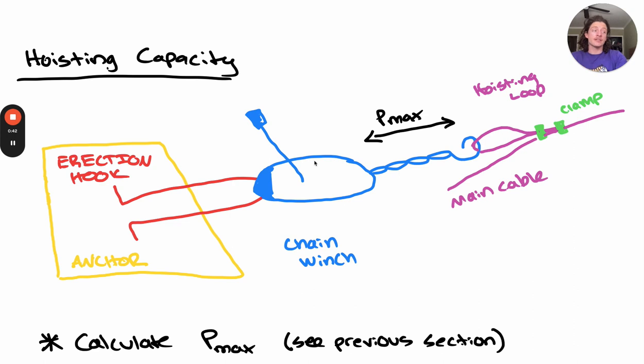As we winch the cables up to their construction sag, we're going to eventually reach our value of Pmax. The winch is hooked to a hoisting loop, which is then clamped to the main cable in order to hoist it up to the construction sag, where we fix the cable and let it sit for 24 hours.